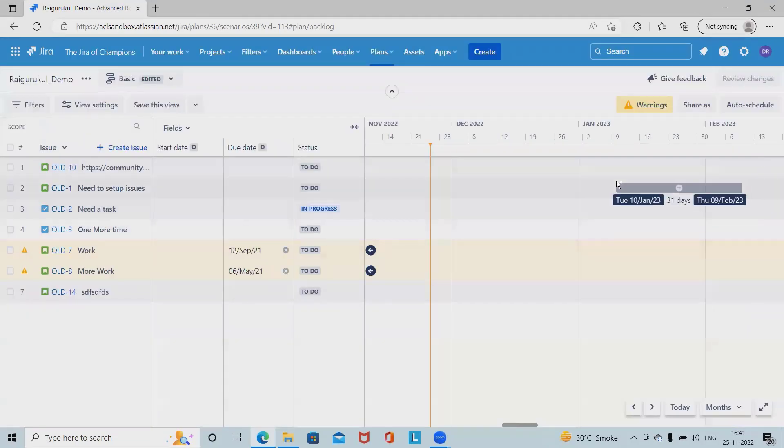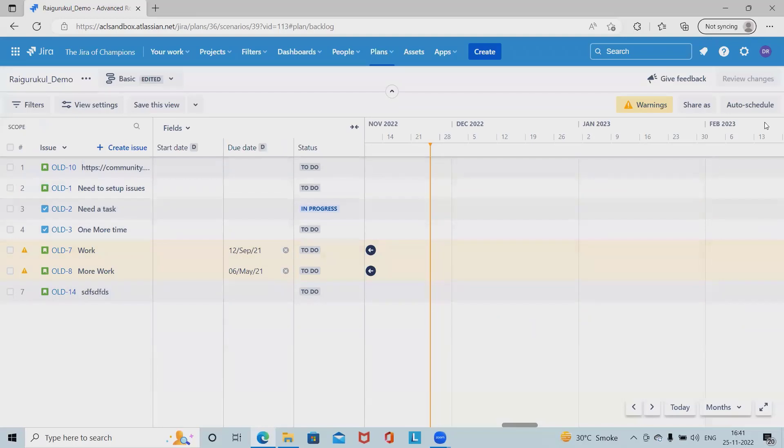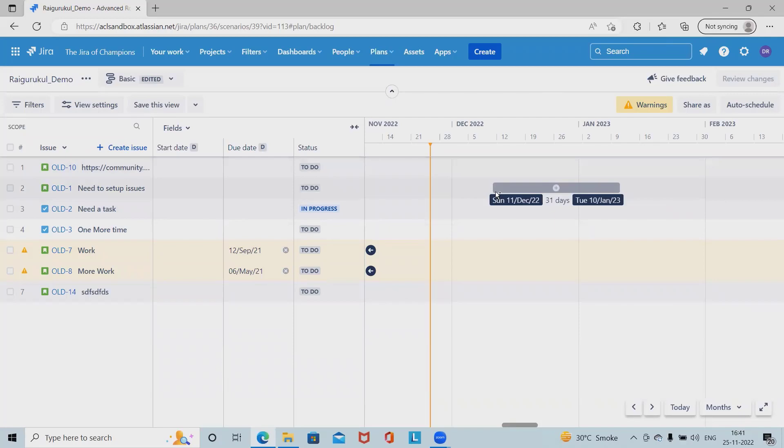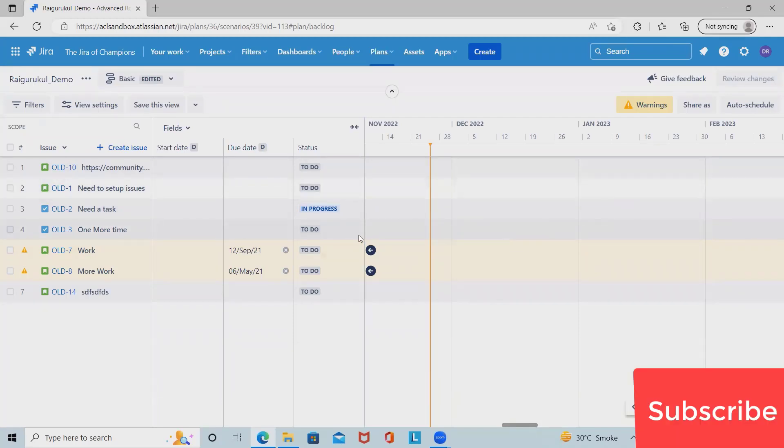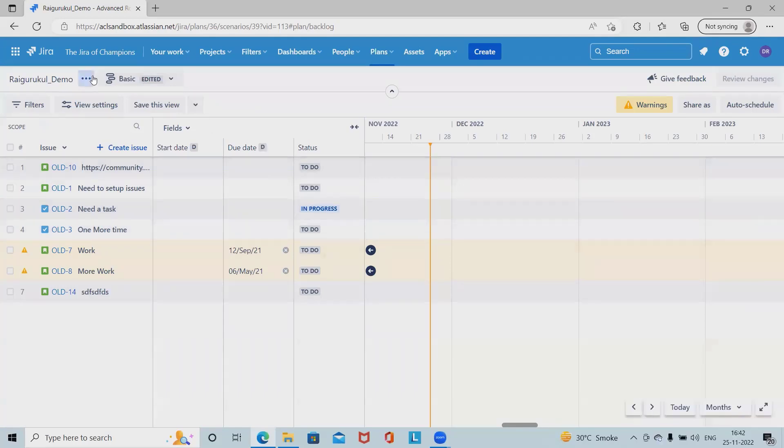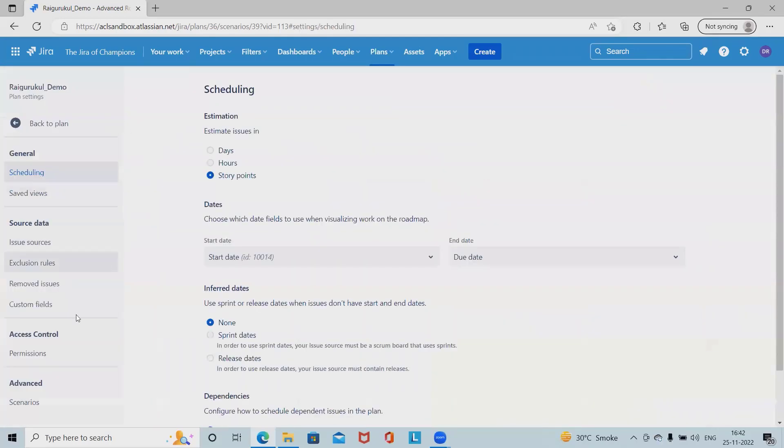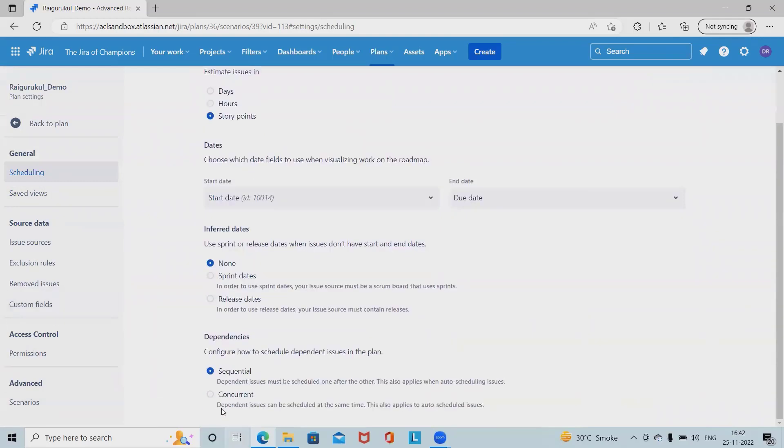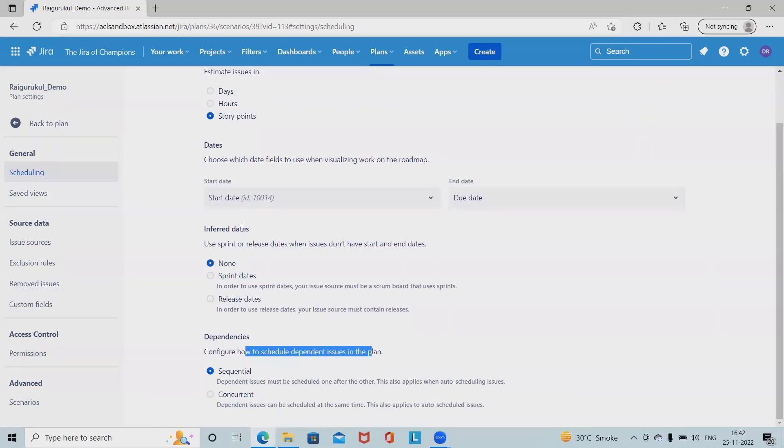If we want to remove it, simply we will remove it from the roadmap sections. We can also have the options of deciding whether advanced roadmap uses concurrent or sequential dependencies. To do so, we have to go to configure and from the configurations, select dependencies. Here you have dependencies as sequential and concurrent. This is how we can view, edit and update our dependencies from Jira Advanced Roadmap.